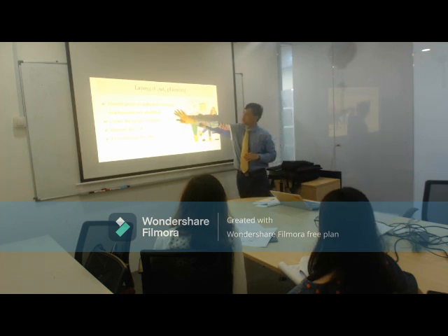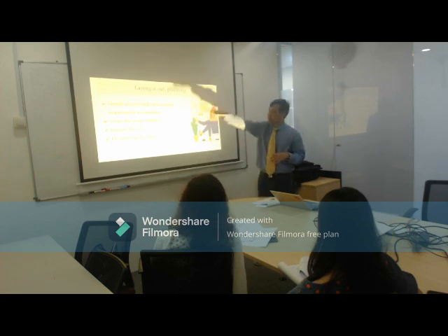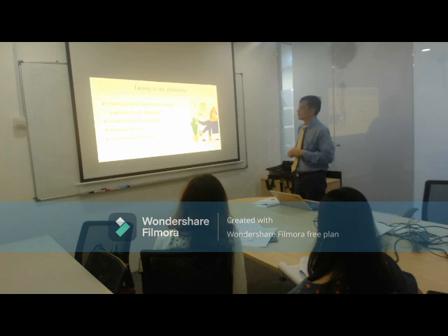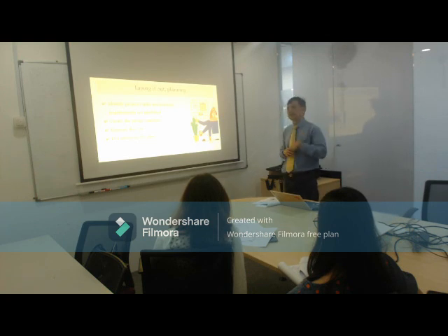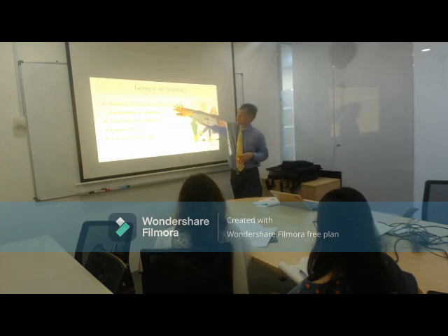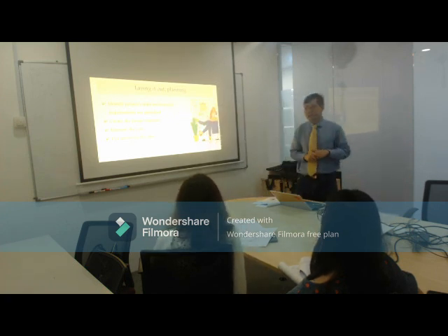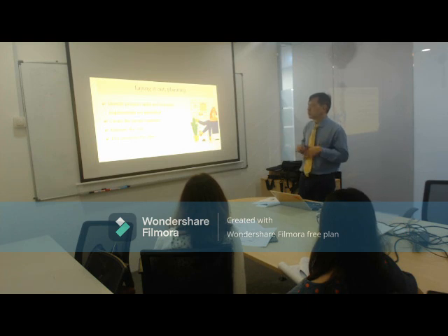What I'm going to do here is to say that, okay, the tasks involved: clearing the place, taping all the things which shouldn't be painted, buying the paint, booking the painter's time, and if I need a permit to do the painting from the building management, I have to apply for that. All those will be part of my tasks. Then the resources here, typically, I'm getting my sister to help me manage it. So those are the things.